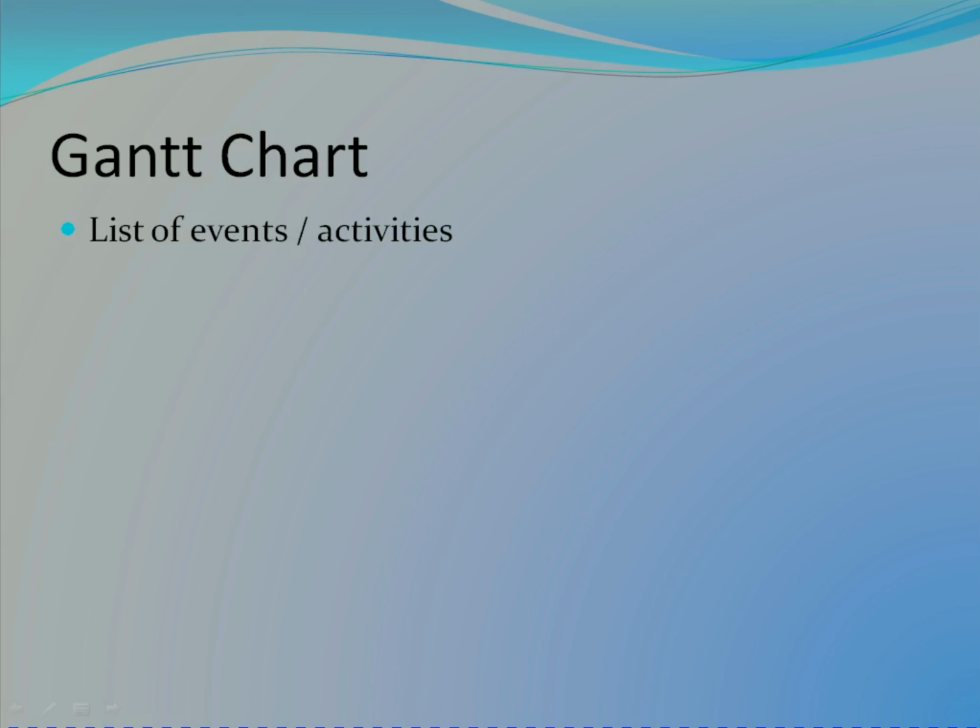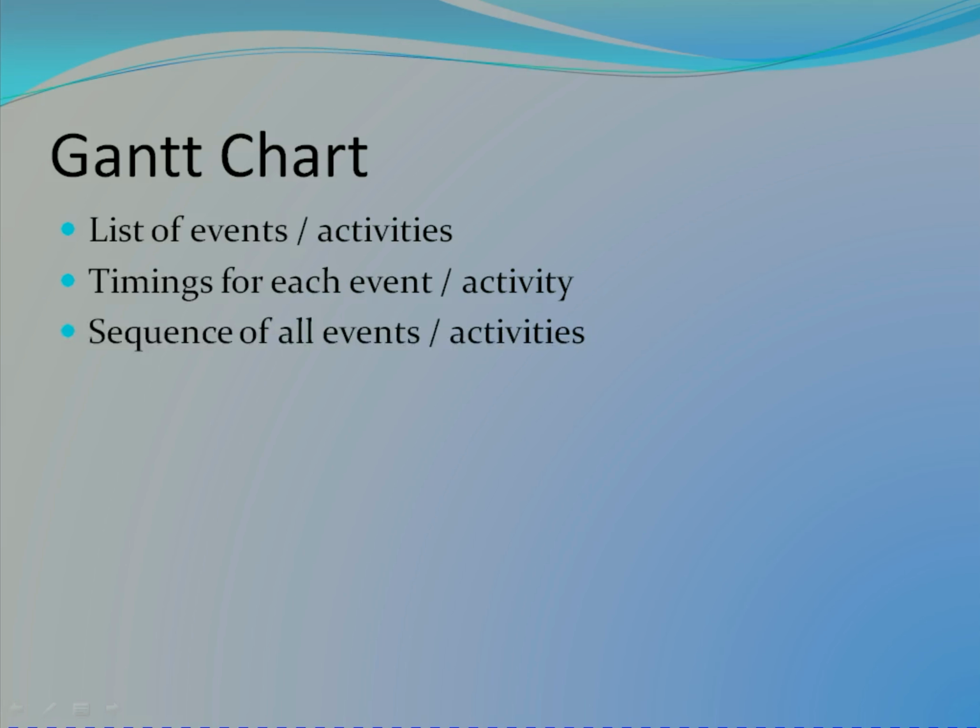Each of these activities takes on a different amount of time, and this is where our next step comes in. Estimate the time that will be required for each activity. Don't underestimate here, as you will get caught out. You will need to engage with the experts in each of the disciplines you're employing to see how much time is required. The next step is to look at the sequence in which the activities need to be completed, as this determines when they need to be placed on the timeline. It also shows if activities can be run alone or in parallel.